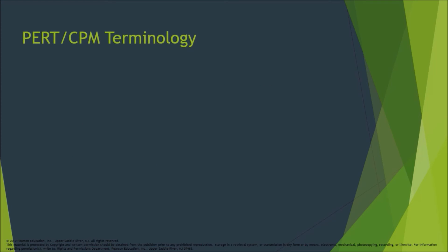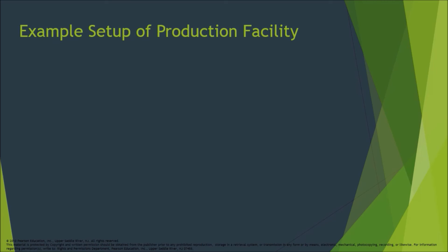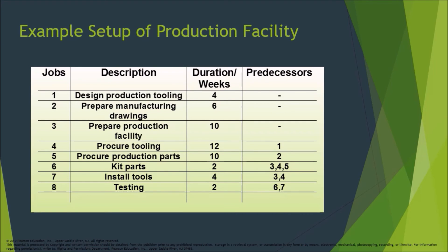PERT/CPM terminology includes Activity, Critical Activity, Path, and Critical Path. An example setup of a production facility: designing production tools is 4 weeks; preparing manufacturing drawings is 6 weeks; preparing production facility is 10 weeks; producing tooling is 12 weeks (predecessor: job 1); producing production parts is 10 weeks (predecessor: job 2); kit parts is 2 weeks (predecessors: jobs 3, 4, and 5); installing tools is 4 weeks (predecessors: jobs 3 and 4); testing is 2 weeks (predecessors: jobs 6 and 7).